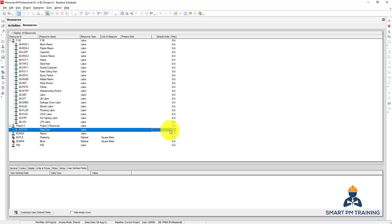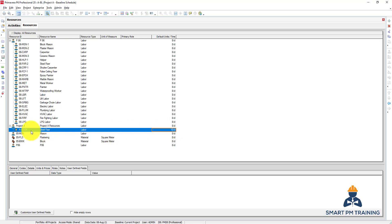So how many hours per day will this resource be working? I will match it with the calendar. If you remember, I had 10 hours assigned per day, so I'll just make it 10 as well, so the resource will be hired full-time in my project.